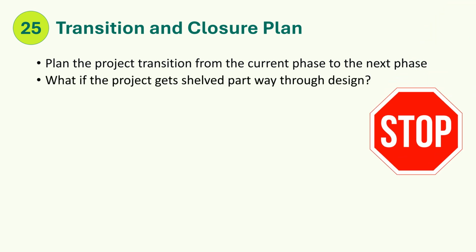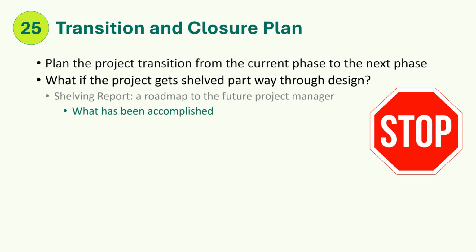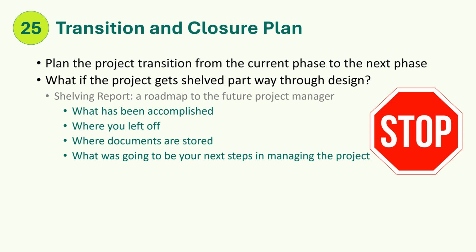What if the project gets shelved partway through design? Shelved means that the project is being completely stopped until further notice. You'll prepare a shelving report, which is a roadmap to the future PM. What has been accomplished, where you left off, where documents are stored, what was going to be your next steps in managing the project, and other vital information.